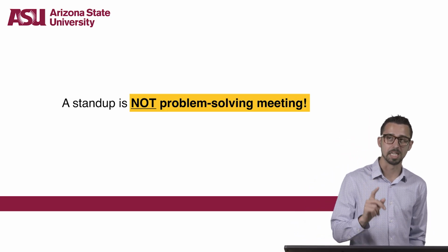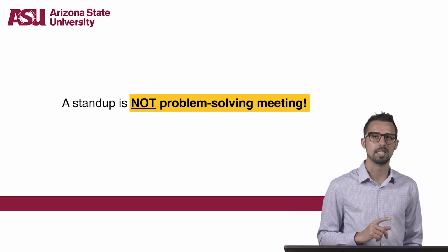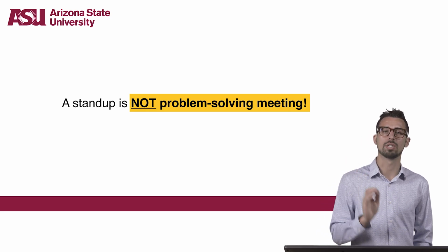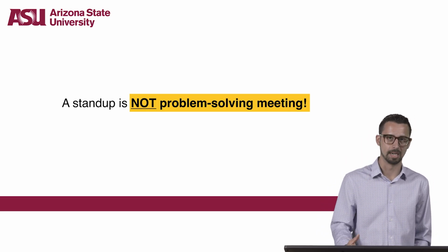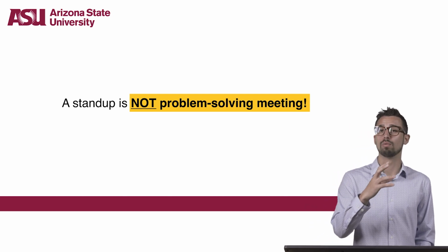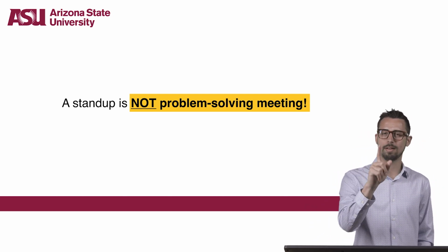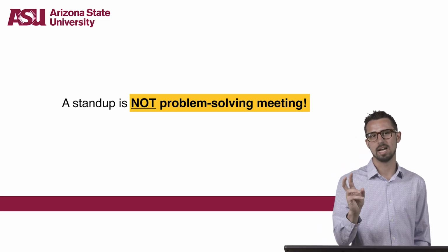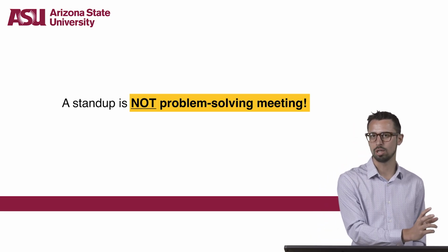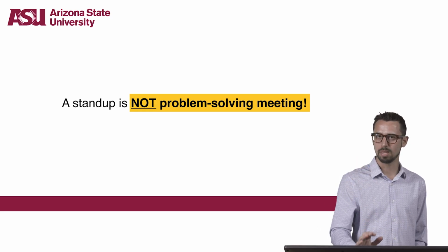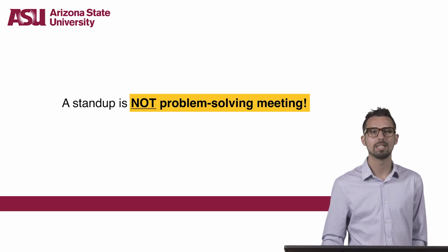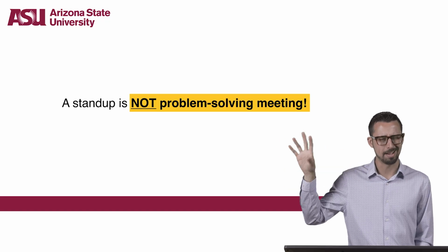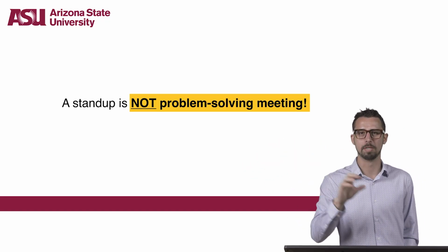Another anti-pattern, speaking of blockers, that you typically see in stand-ups is that the team begins to solve problems as they become apparent. Stand-ups are for realizing that there are problems, not for solving them. When you catch that the tone of the meeting has shifted into problem-solving territory, kindly stop the conversation, add those issues to a parking lot. That's a grossly corporate term, but I'm going to use it here.